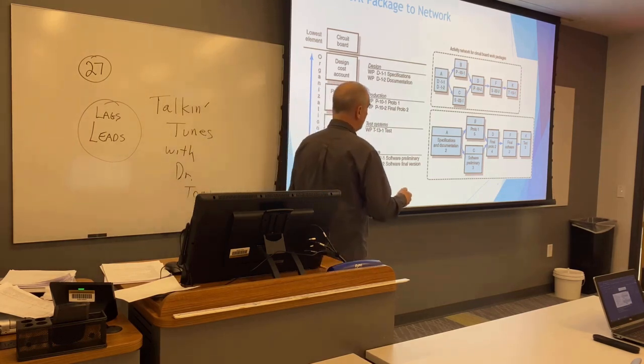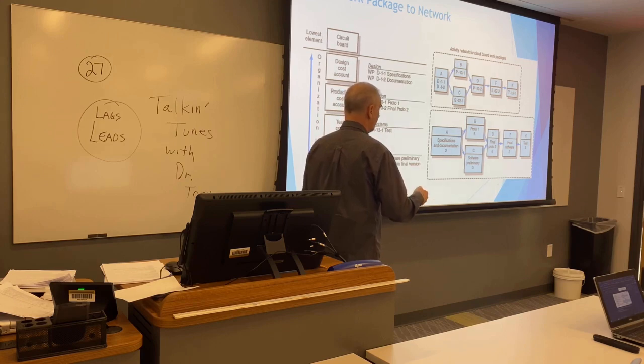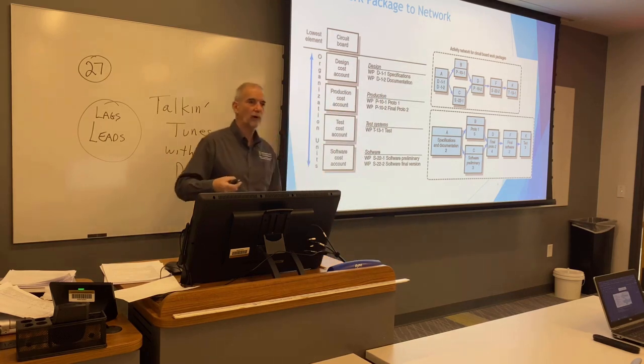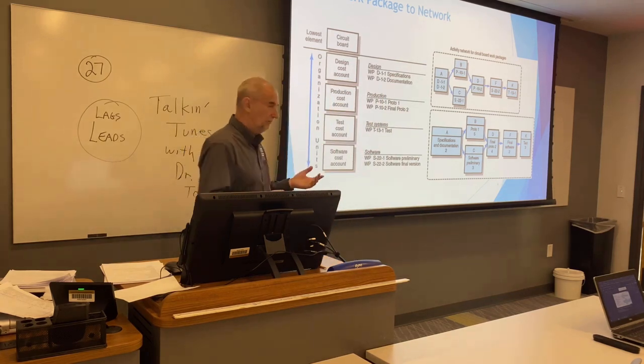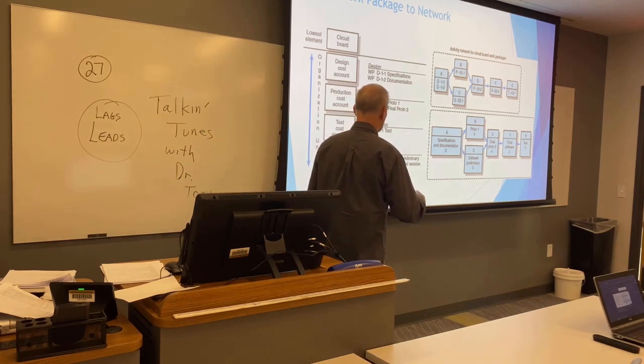But then, before you can do the final prototype, you have to have the software and the initial prototype, both together. Then, bless you, you're going to do the final software, because once you get the final prototype, you may have to go in and tweak the software, because it may not be working the way you want. But once you do the final software, then you're going to test it, test the system.